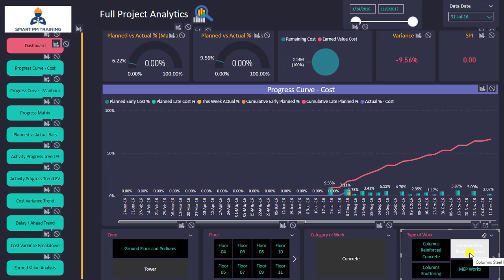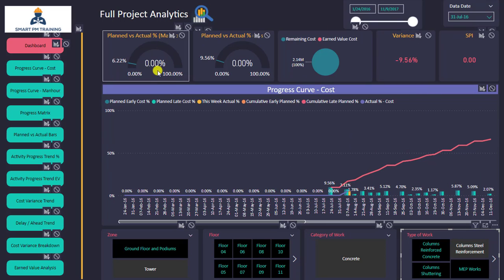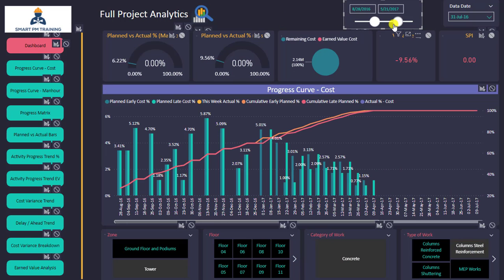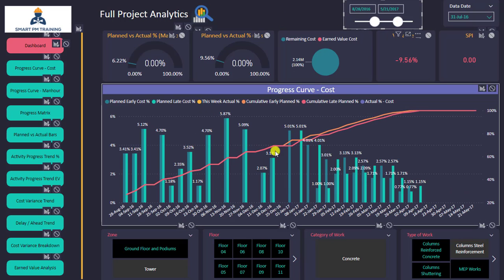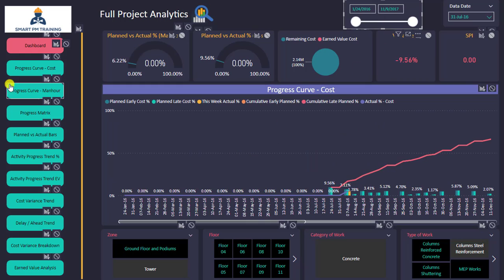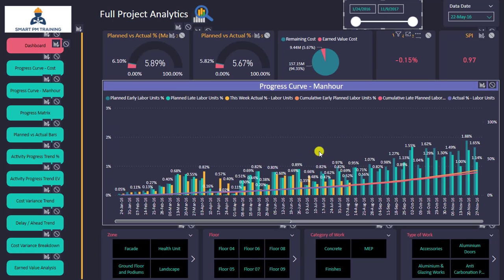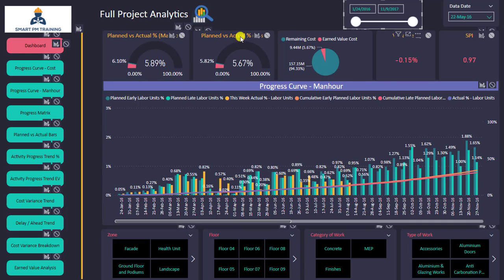If I select column steel reinforcement, I can see from the indicators that there are no actual percentages but there is some planned percentage — it's obviously in delay. I can also use the slider again anytime I want; everything is synchronized.